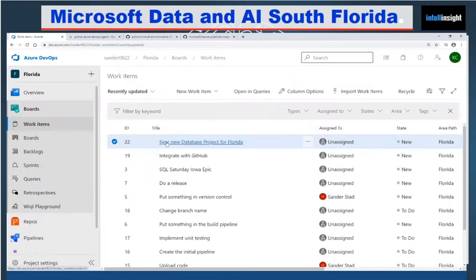First of all, there's work items, which should just show you every single item you have created for your project. I should say for your area you're working in, just a standard drop-down format, regardless of what type it is. Now, work items is really good if you want to look for backlog items that you've actually removed. So it's a handy trick to bear in mind if you ever have a backlog item removed by somebody, or if you want to see which items have been removed recently.